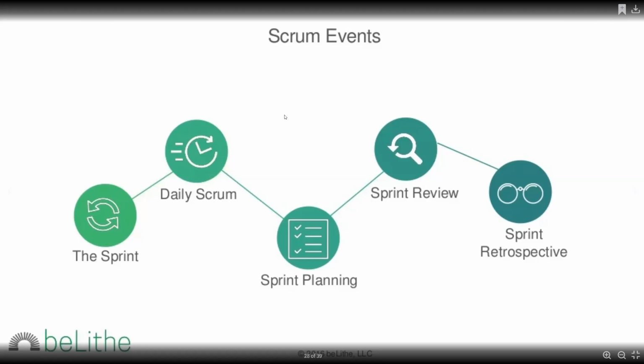Grooming means you open the stories, you check the dependencies from other teams, and things that are missing that need to be addressed. That way, developers are not chasing around looking for these things. They just get what we call the groomed story. It has been sized and is ready to be taken into development. So that's why there's a differentiation of skill sets.